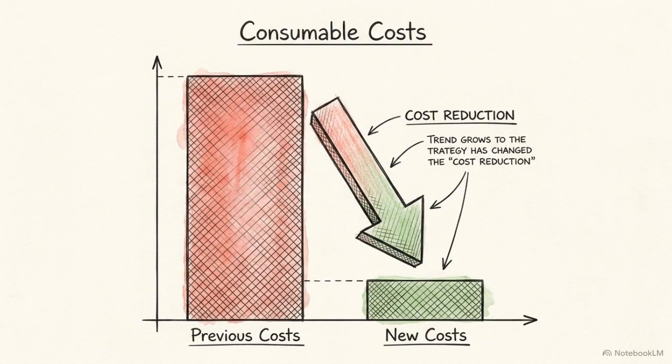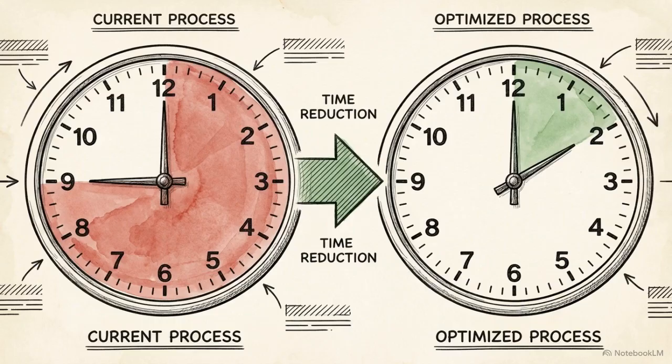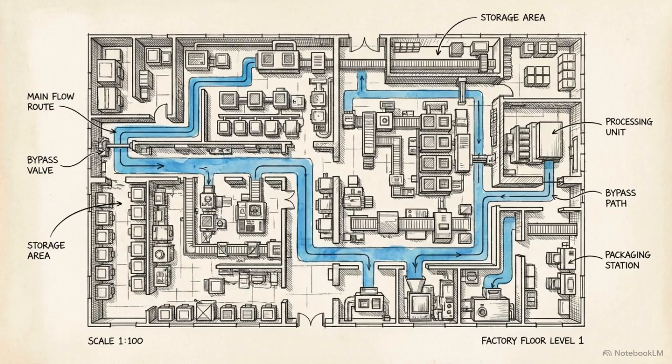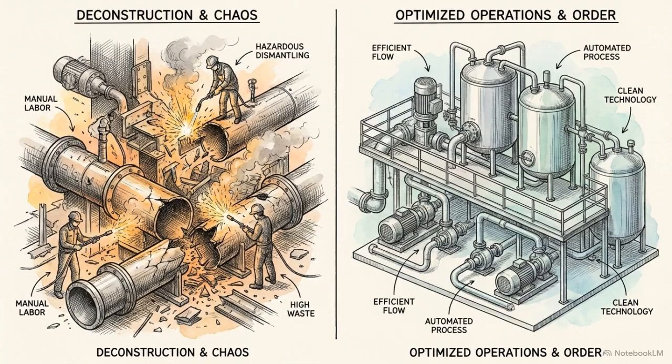Adjusting the molecule to fit existing column hardware reduced overall resin costs by $1.9 million and slashed processing time for the first step from 70 hours down to 26 hours. Actively redesigning a research process to fit a commercial facility's existing physical layout is superior, both economically and temporally, to retrofitting a steel facility to accommodate a rogue process.